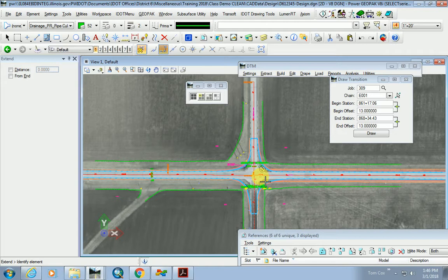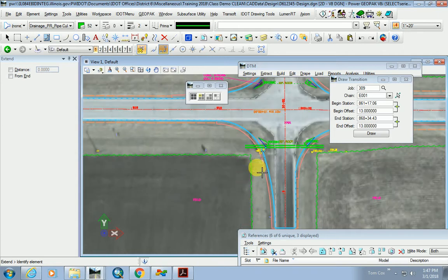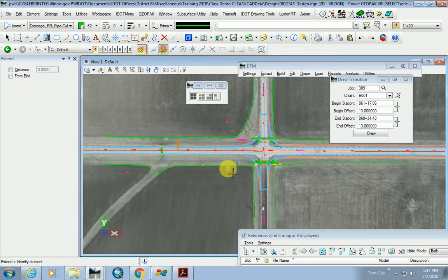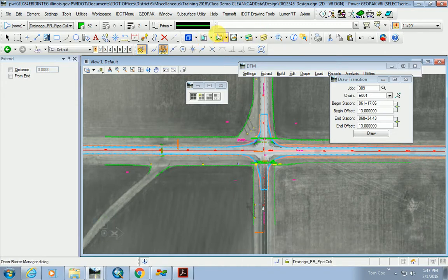You say, hey, I'm doing some work here. Could you provide existing right-of-way for me? So he'll do his research. He'll look to see if there's any existing old CAD files. He might have to go to the courthouse to get information. He might go online, a variety of ways that he can get the information. But it's still not going to be 100%, because when it comes to property, it's dependent upon where the property pins are, regardless of what any dimensions say on a plat or anything like that. You'll see it says plus or minus because the distances aren't black and white, like solid. They're more like approximate, but when it comes to right-of-way, the property pins take precedence over everything. But you're not going to do that initially. So to get started, tell him. He does the research, and then in CAD, in his own folder,